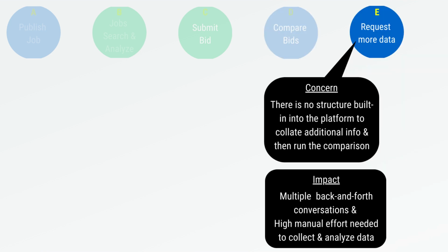For each job, competing freelancers will submit their solutions and costs, each with their own highlighted differentiators. So comparing different bids and the submitting freelancers is massively challenging. When the project complexity and size increases, the complexity of bids comparison increases exponentially. The impact is a significant manual effort to be spent on bids comparison. In most large jobs, this complexity drives up the duration needed for RFP to contract to 2 to 3 months